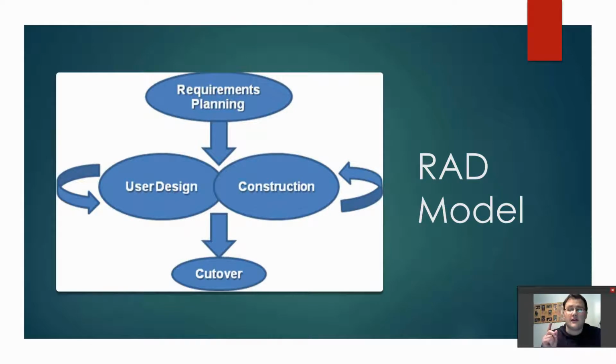The user gives their requirements, they construct it, they got to verify it, and then final stage is the cutover stage. This is the part where there's the delivery of the new system to the customer, and planning for this must begin early in the process because they want to be quick. That's why it's rapid. This also includes testing, training, and dealing with changes, and also running new and old system together in parallel.